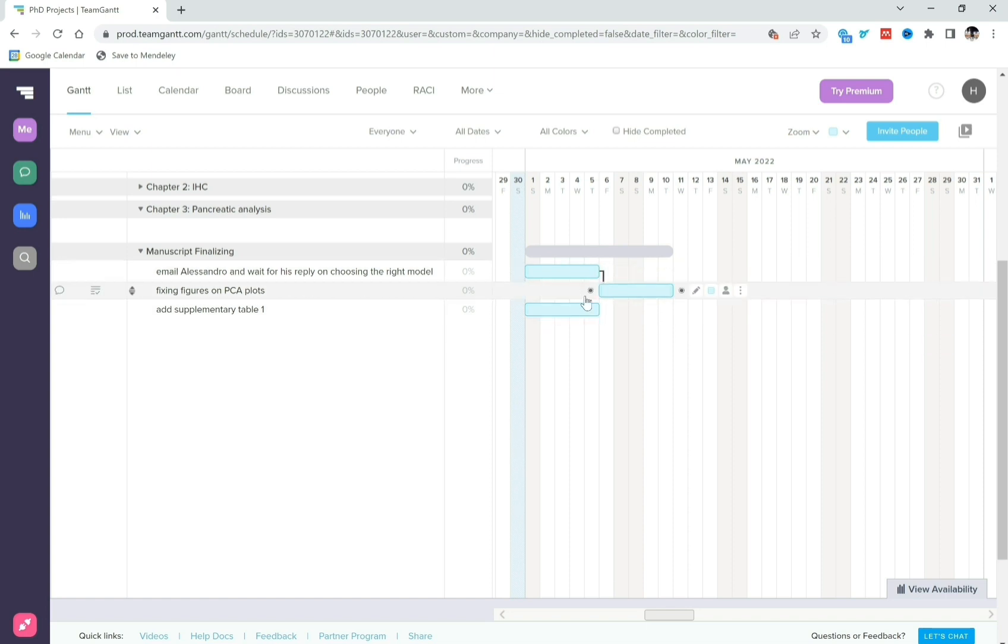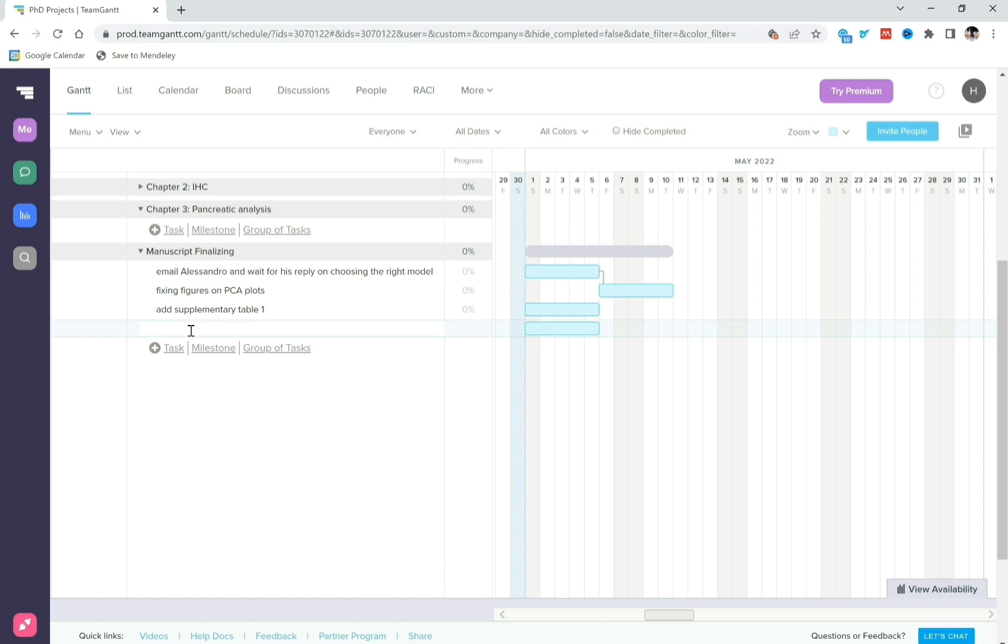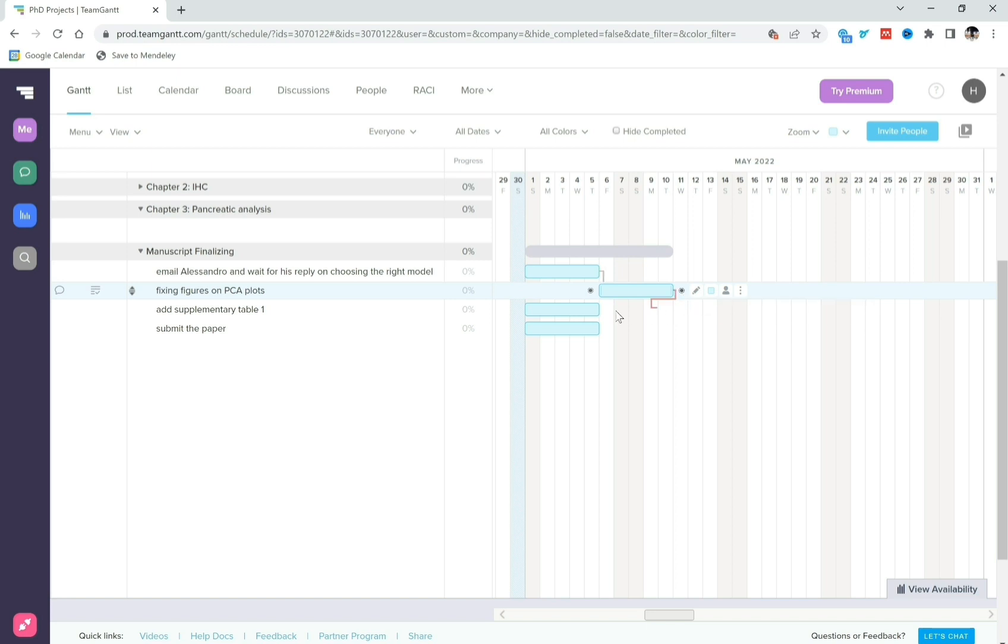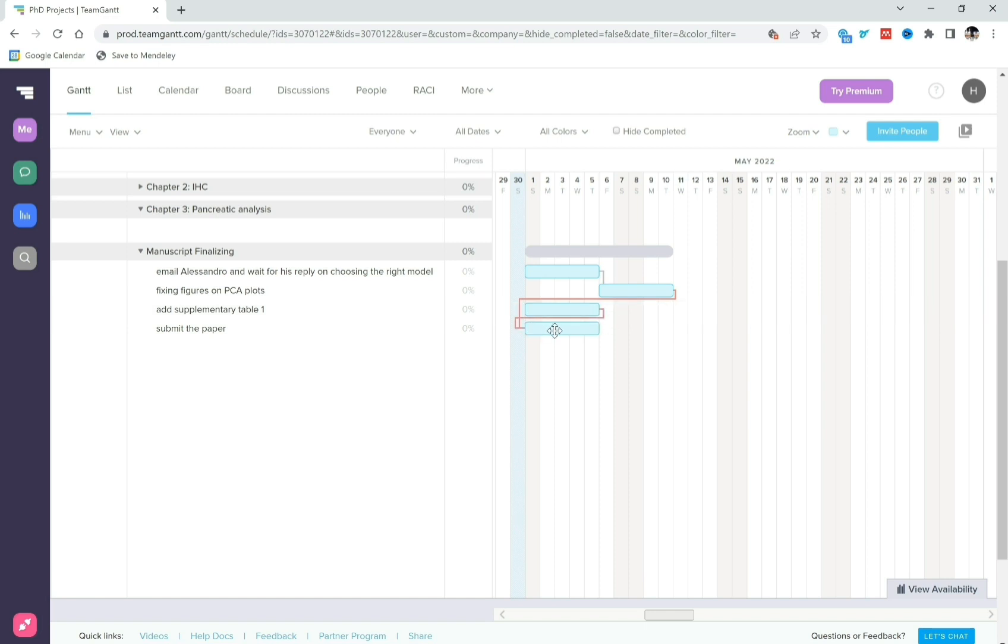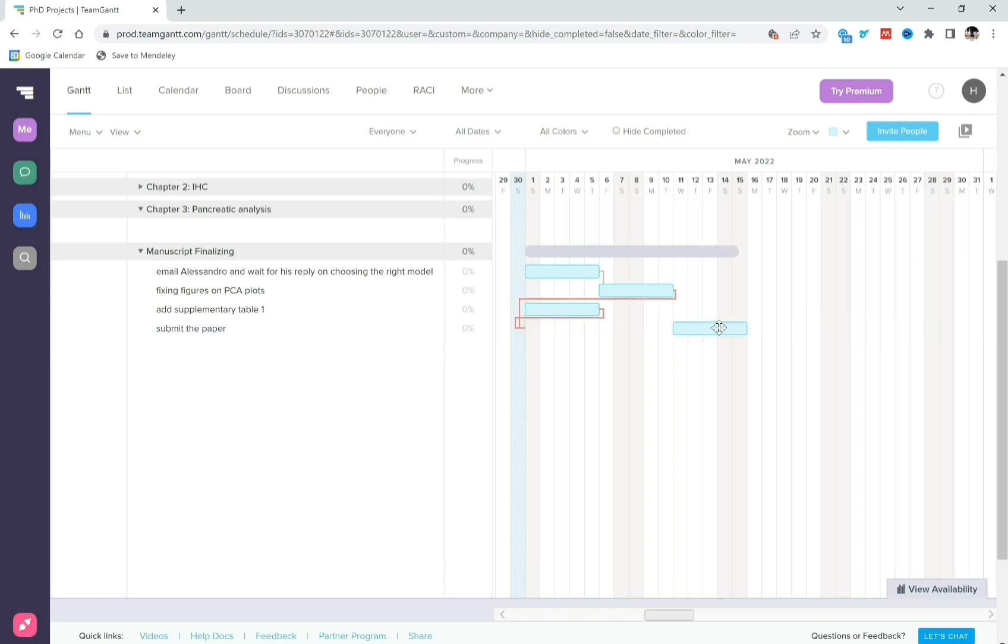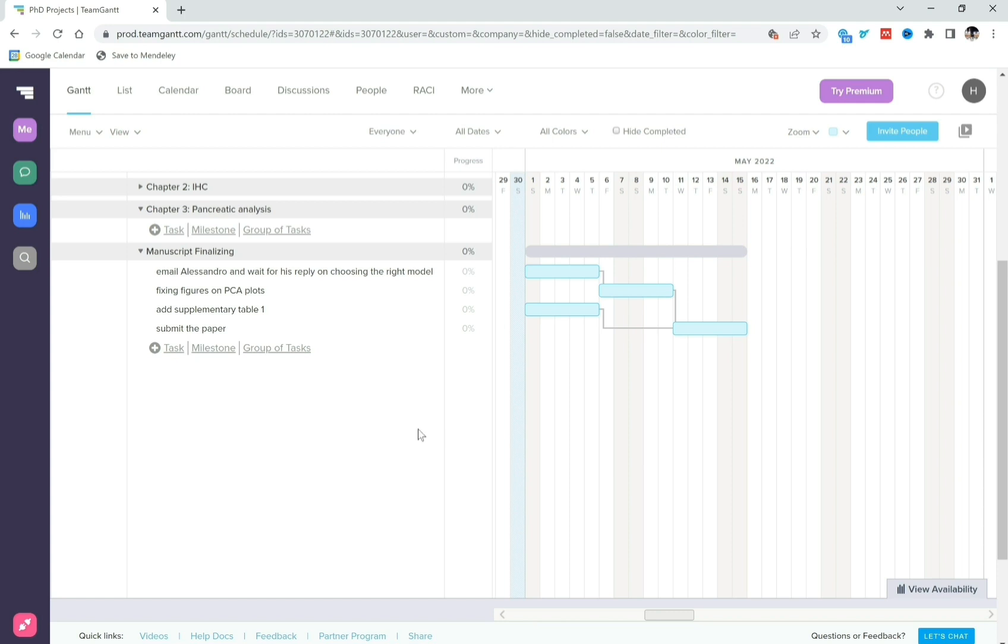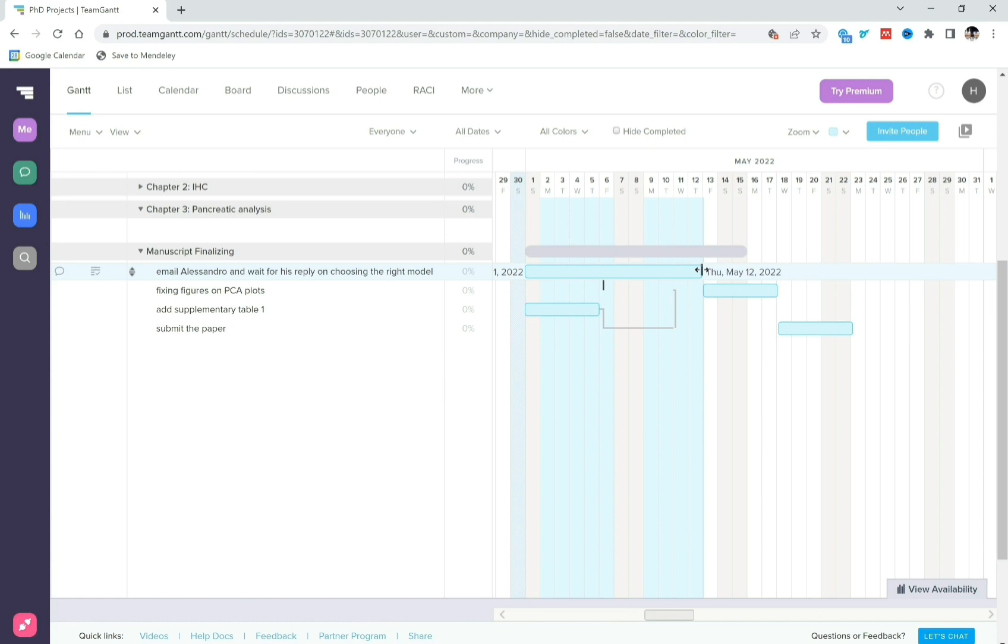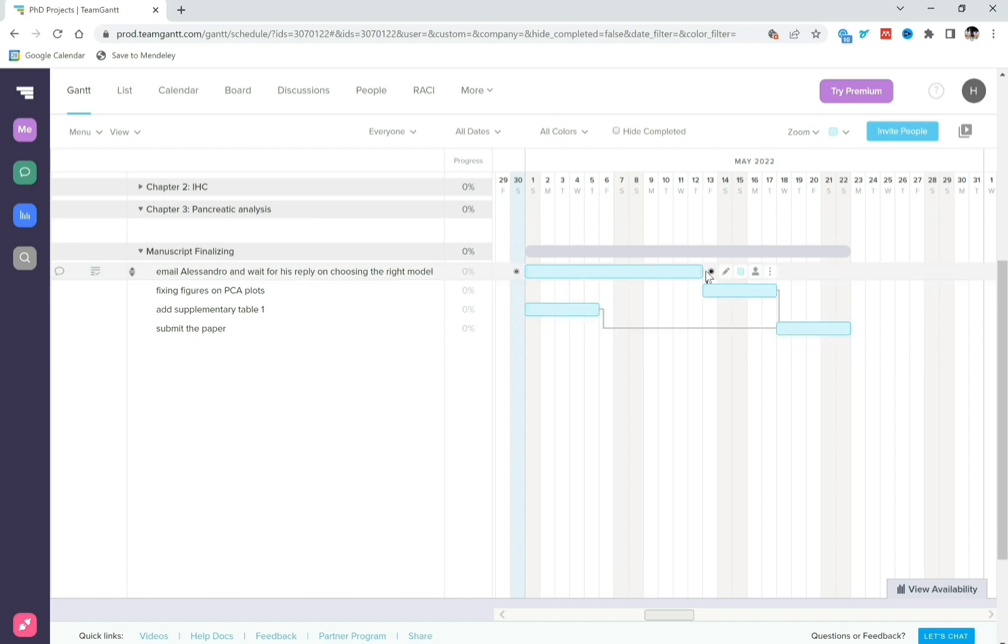And then say I need to add supplementary table one. I can do this anytime from now, so this task is independent of these two tasks. However, my final task, which is to submit the paper, for example, and complete the draft, that can't be done until I fix the figures, and it also can't be done until I add the supplementary table one. And so that means that this can't actually be done until here. And now what happens is the really cool thing about this app which makes time management and planning your project and seeing deadlines so so clearly and easily is that, for example, Alessandro takes time to get back to me and he doesn't get back to me within two weeks. Do you see how this end result is actually being pushed forward because I can't actually then submit the paper until the 17th.